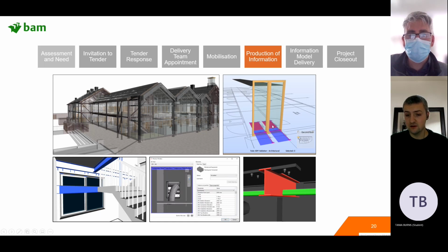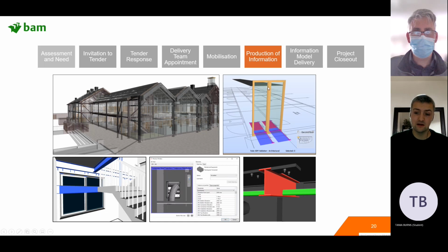This is software which is again really smart, and what it does is it'll virtually open your doors and make sure the doors don't touch anything. Traditional clash detection doesn't check your door swing. It just clash tests as it is standing. So that's a new level of intelligence in the software, and it helps us to pick up issues like that at the stage of production of information.